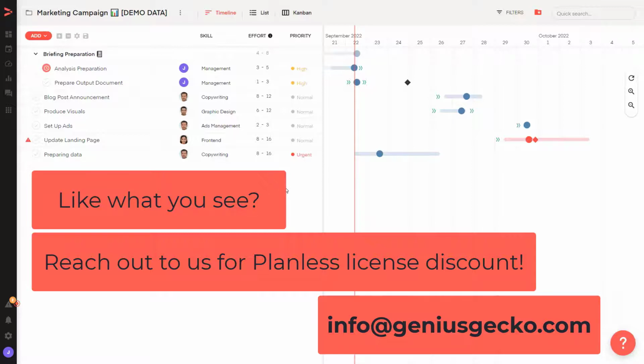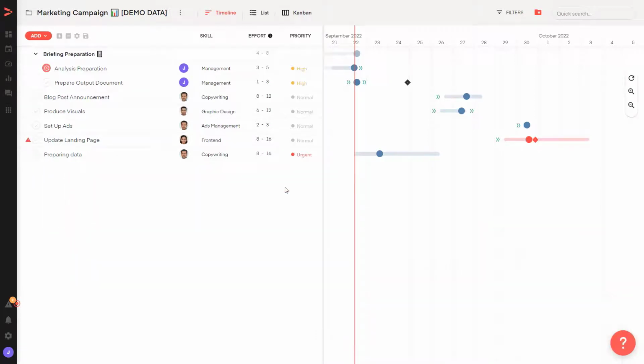But the problems appear when there are, for example, two tasks that have to be finished at the same time by the same person, and there are a lot of dependencies before, for example. So in the end, it turns out that with our plan, we end up with these tasks being done a bit too late, and then we have to replan everything.